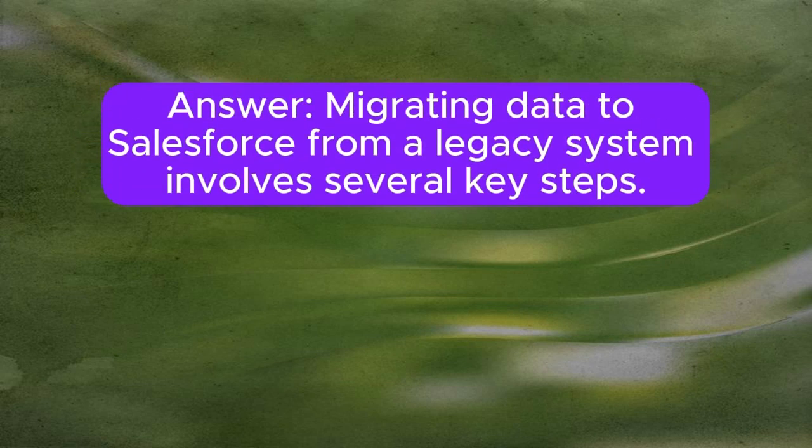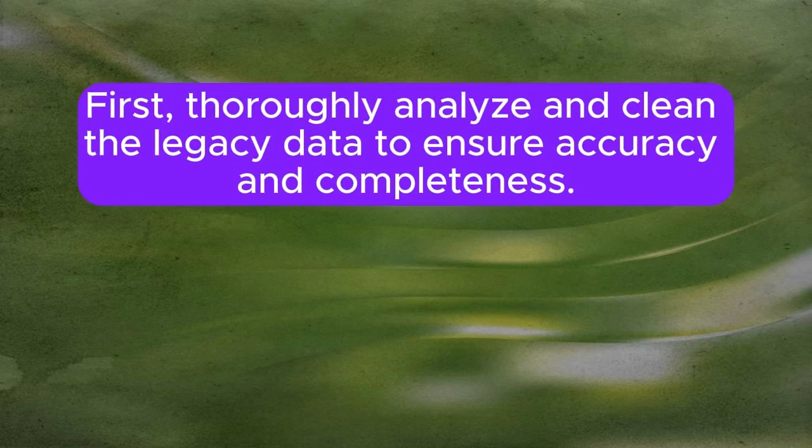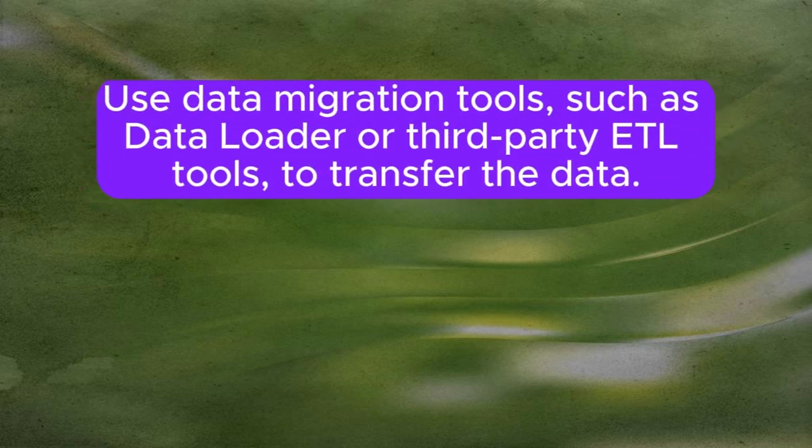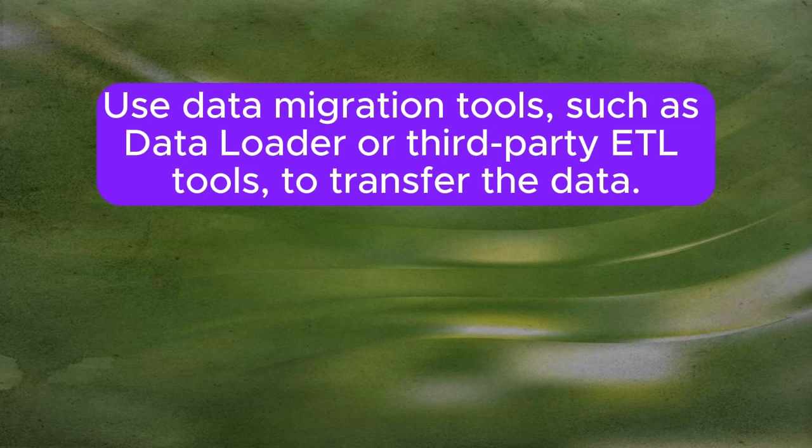Answer: migrating data to Salesforce from a legacy system involves several key steps. First, thoroughly analyze and clean the legacy data to ensure accuracy and completeness. Next, map the legacy data fields to the corresponding Salesforce objects and fields. Use data migration tools, such as Data Loader or third-party ETL tools, to transfer the data.